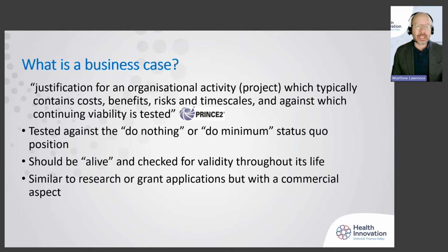So what is a business case? There are multiple definitions out there depending who you ask. The Prince2 one, which is a project management methodology used in the public sector a lot, and of which I'm a Prince2 practitioner, says it's a justification for an organizational activity or project which typically contains costs, benefits, risks, and timescales, and against which continuing viability is tested. Quite succinct, but a lot of content in there. You can see it wants to have a lot of things included and weighed up. So really a balance between all of them.